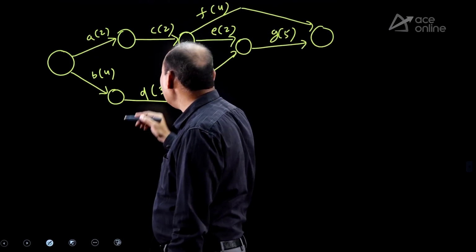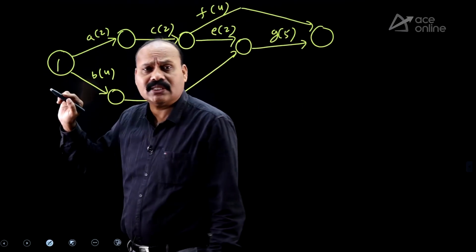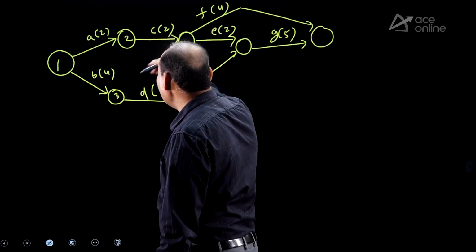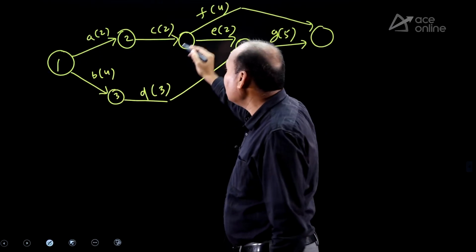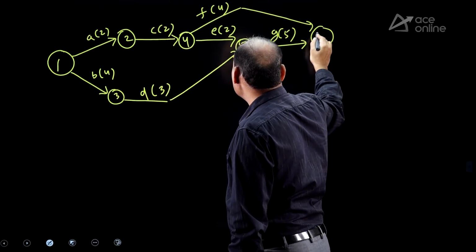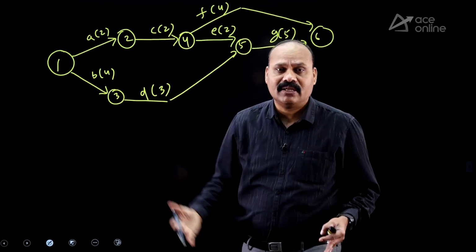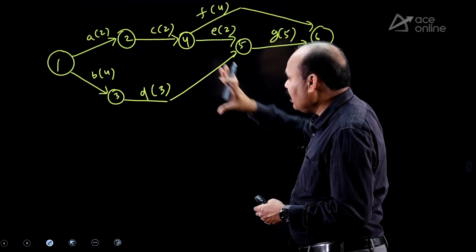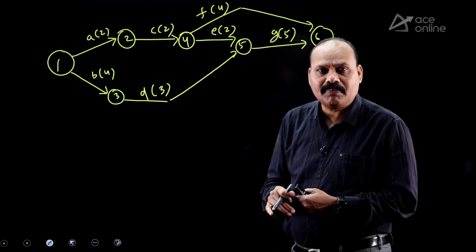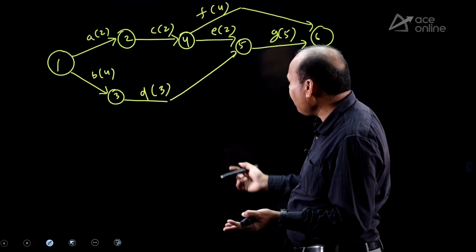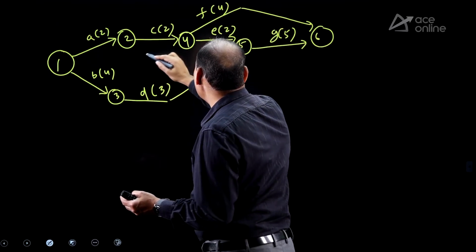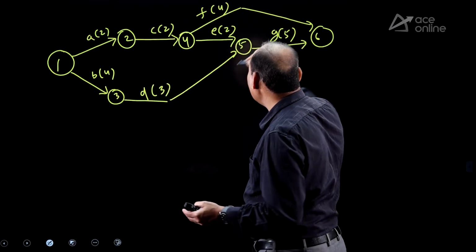Before finding the critical path, you can use Fulkerson's rule for event numbers: tail event number less, head event number higher. 1, 2, 3. 2 and 3 can interchange, no issues. 4, 5, 6. After marking the events, identify the critical path by observation. The paths are 1, 2, 4, 5; 1, 2, 4, 6; 1, 2, 4, 5, 6; 1, 3, 5, 6.